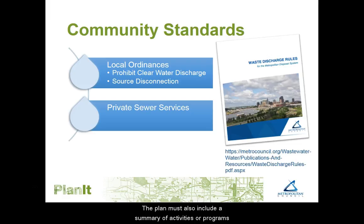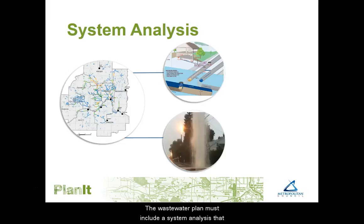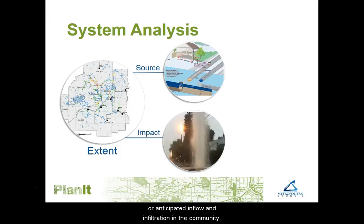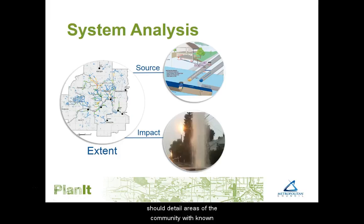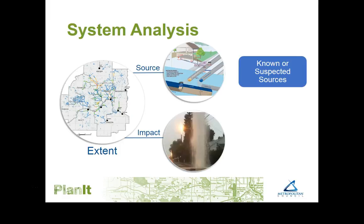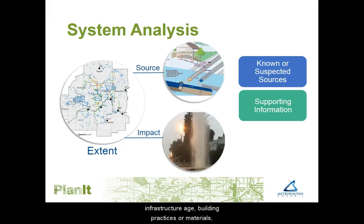The plan must also include a summary of activities or programs intended to address I&I from private property sources. The wastewater plan must include a system analysis that describes the extent, source, and significance of existing or anticipated inflow and infiltration in the community. A complete system analysis should detail areas of the community with known or suspected sources of I&I, based on information such as previous studies, infrastructure age, building practices or materials, soil conditions, or topography.